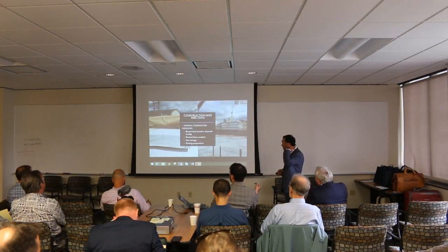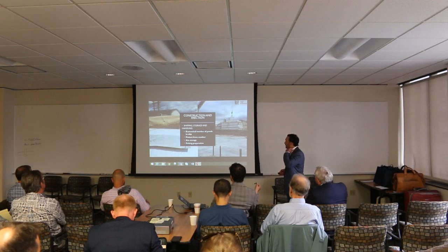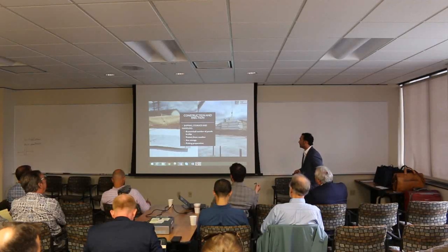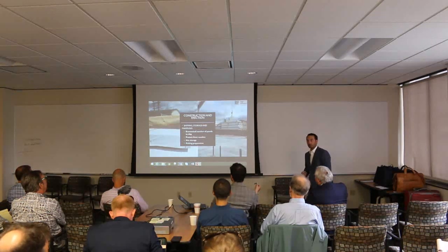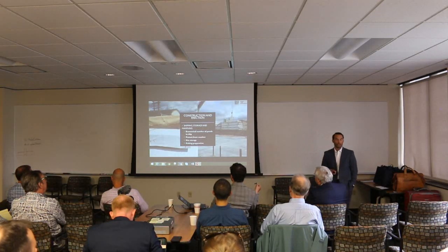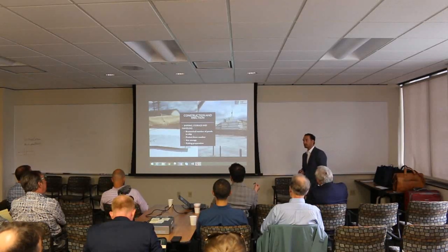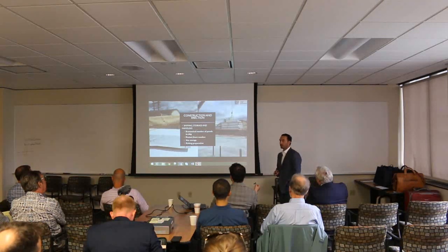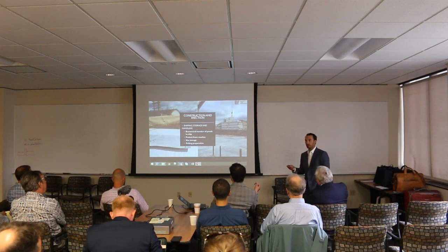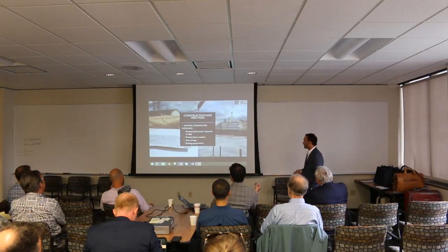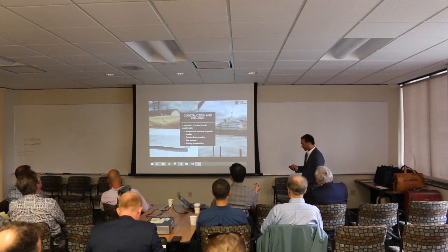Next would be shipping, storage, handling. The number of panels you can ship is kind of interesting due to the lighter weight than concrete. If you think about precast construction, done in a plant that they ship out on a truck. Similar size panels, 10-foot widths maybe, work well for shipping, yet they're extremely heavy when compared to these. These are about a third the weight of its equivalent size. So you can get a lot more pieces on a truck.